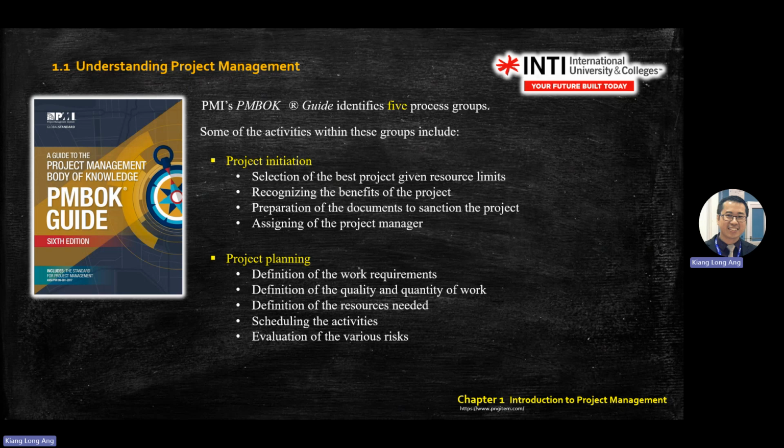Because sometimes for a project you need to do bidding, you need to bid for that project. So you prepare the documents, or you need to present a proposal to your sponsor or the government. So this one is the preparation of documents. Sometimes you need a permit, you need to submit all these things. Then you assign a project manager. So your role as a project manager starts from here. Okay, start from here. Then you do planning already.